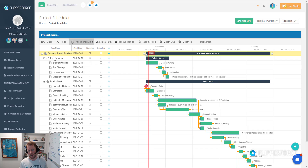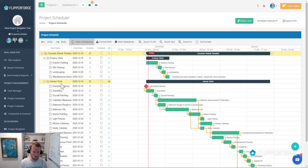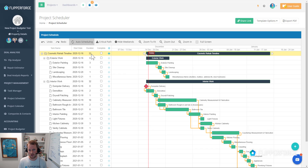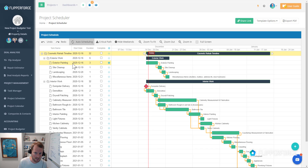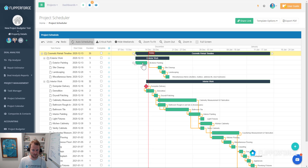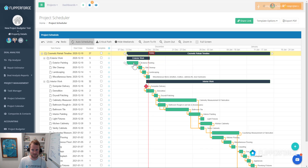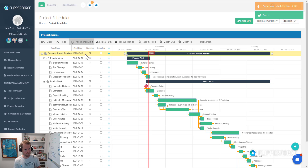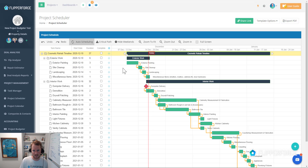The cosmetic rehab timeline is the highest folder structure. Then you've got the exterior work and interior work folders, and then the actual work items below those. The overall duration and start date of the cosmetic rehab timeline is based upon the subtasks below it. The very first item on the project schedule is exterior painting, starting on December 16th. If we change that — you can see how I'm moving this on the Gantt chart — and change it to a start date of the 10th, that affects the overall start date of the entire cosmetic rehab timeline as well as exterior work.